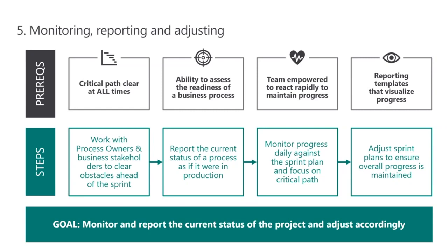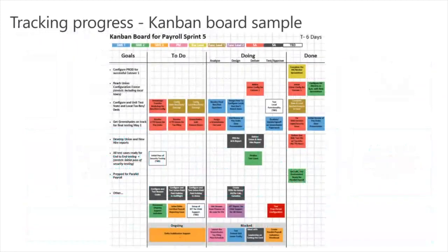Think of reporting in visual terms. It's very important that when you're reporting progress, you have some kind of visual clue that the business and stakeholders can get engaged in. People outside of your project may not be familiar with the language and the jargon used in an ERP delivery. They may not understand what you mean by a specific DevOps task where you've got to do some posting profile configuration. Define it in terms of business flow.